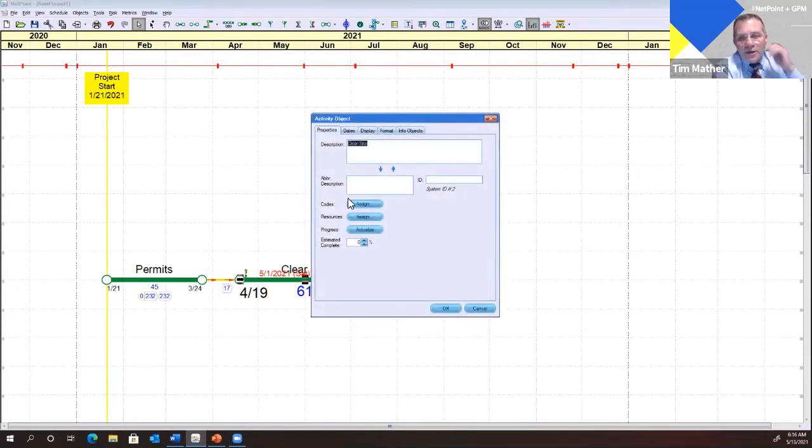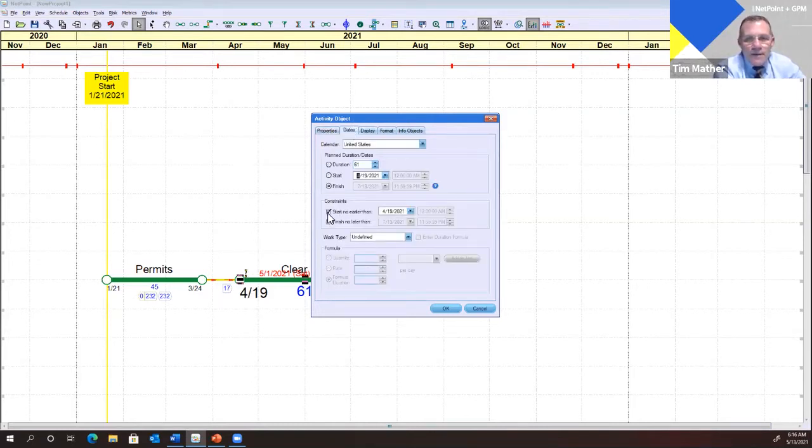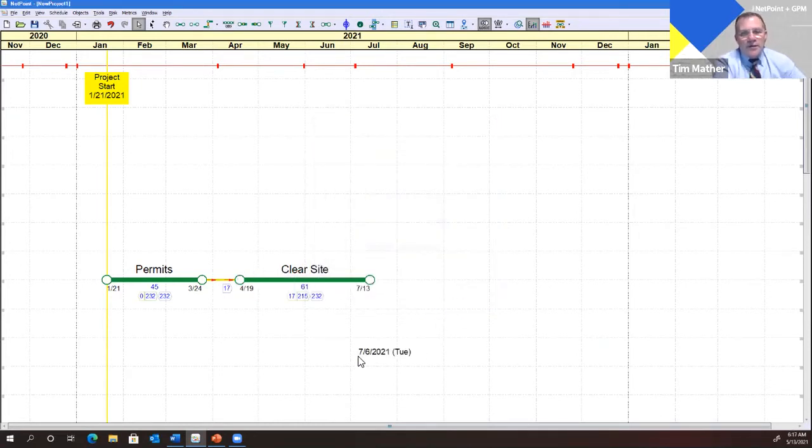Dr. Vivek is going to give, during our advanced talk, a tutorial on how to interact with P6 and NetPoint. And sometimes people use the constraint to keep something from moving to the left once it's recalculated in P6. So you can see now that we have 0 days of drift because permits is starting directly on project start, 232 days of total float.